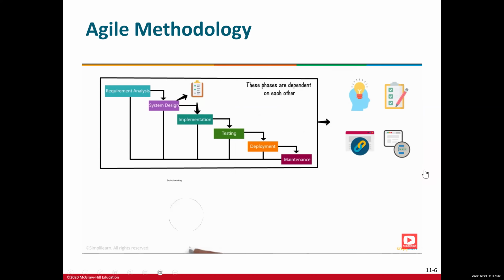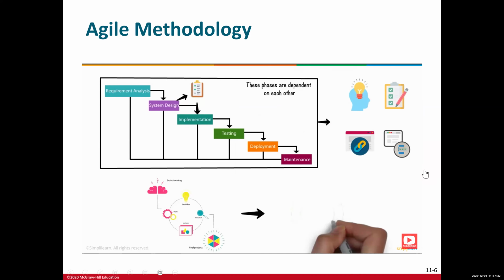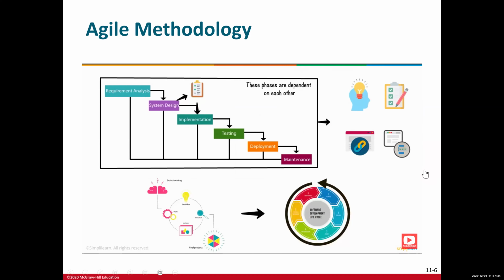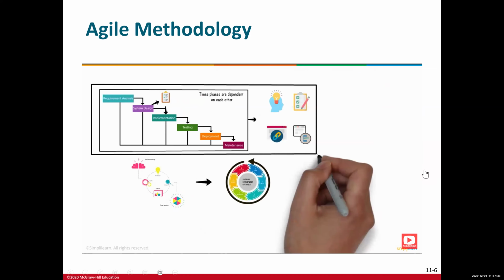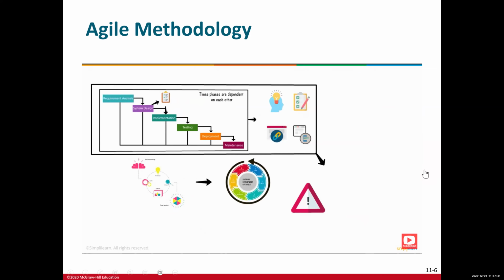In contrast, the final version is available only after completing the entire software lifecycle process, with any deviations if available. Changes in the waterfall model contain high risk, as changes include a new, revised version of the entire software running the entire series of steps again and again.